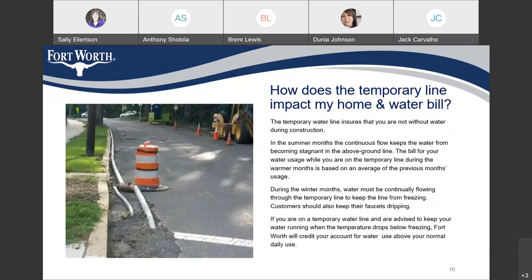How does the temporary line impact my home and water bill? The temporary water line ensures that you are not without water during construction. In the summer months, the continuous flow keeps the water from becoming stagnant in the above-ground line. The bill for your water usage while you are on the temporary line during the warmer months is based on an average of the previous month's usage. During the winter months, water must be continually flowing through the temporary line to keep the line from freezing. Customers should also keep their faucets dripping. If you are on a temporary water line and are advised to keep your water running when the temperature drops below freezing, Fort Worth will credit your account for water use above your normal daily use.